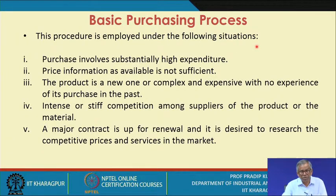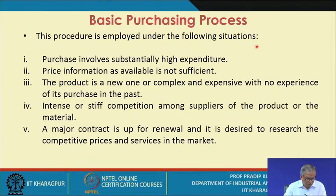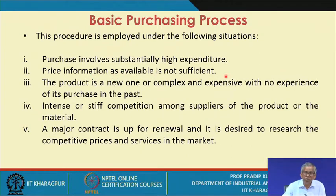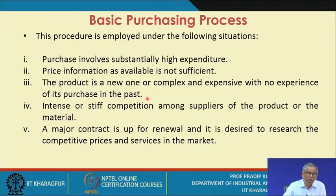This procedure is employed under the following situations. The bidding process is considered a foolproof system when the purchase involves substantially high expenditure. Price information as available is not sufficient, so you need to explore the market intensely. The product is a new one or complex in design, manufacture, and expensive with no experience of its purchase in the past — meaning this is the first time you encounter such an item to be procured from an outside source. Also when there is intense or steep competition among suppliers of the product or material.